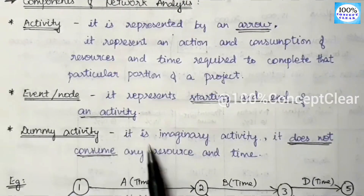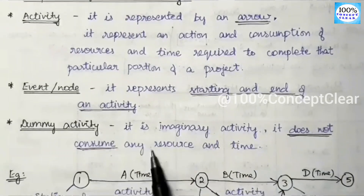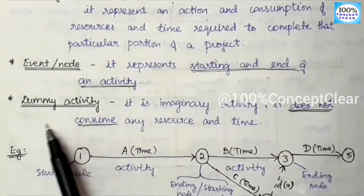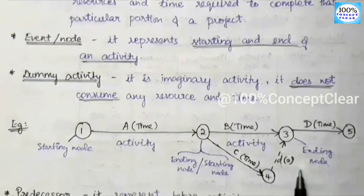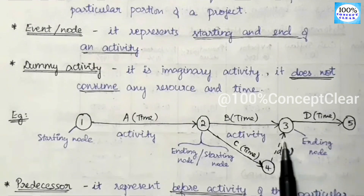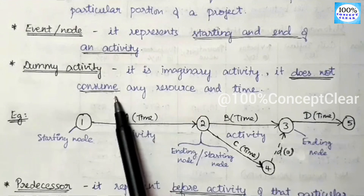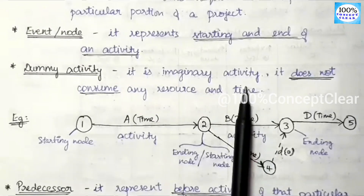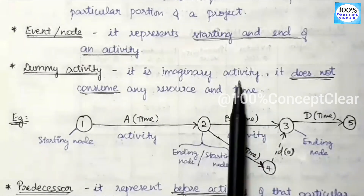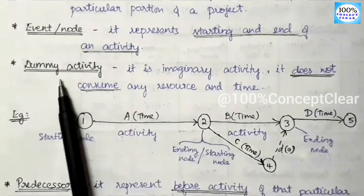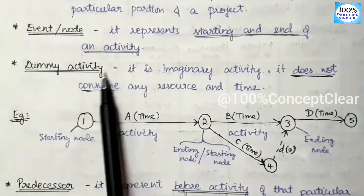The next component is dummy activity. It is an imaginary activity — it does not consume any resources or time. Activity is represented by a solid arrow, whereas dummy activity is represented by a dotted arrow. This dummy activity does not consume any resources or time because it is not a real activity; it is used to reduce the complexity of the network diagram.